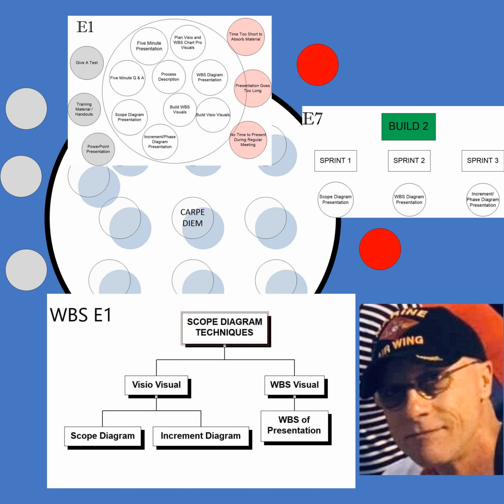What were they going to do? So now you've forced people to actually think about the whole process, go through the process with their team, and write it down. Why? Because you required it. It had to be in the report. So now not only have you got the scope and the deliverables, but for every single thing that was moving, the owners of that application had written it all down and gone through it with their team.